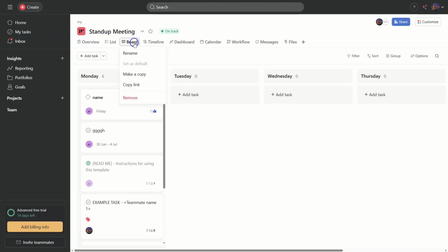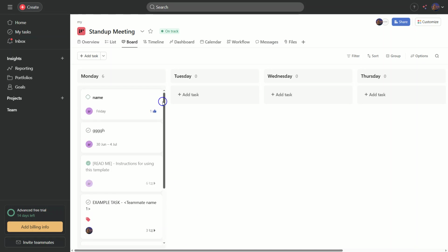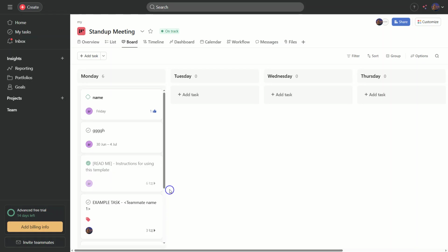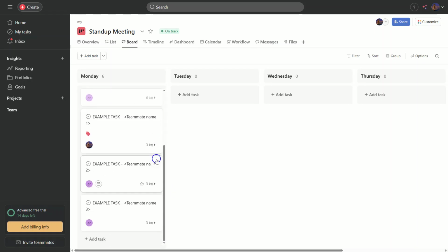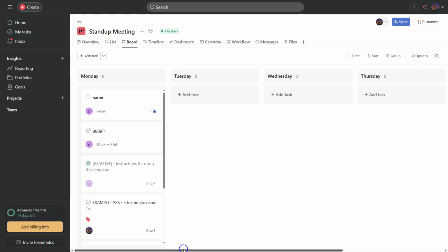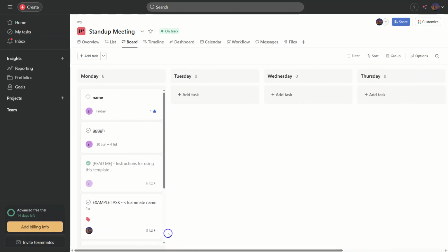This step is crucial because it enables you to visualize your project in a more organized, tangible way, making tasks seem less daunting. Now that we've done that, you'll see your project displayed as a series of vertical columns or boards. Each column represents a different phase or component of your project. The reason we do this is to break down larger projects into manageable parts, making it easier to track progress and identify bottlenecks.